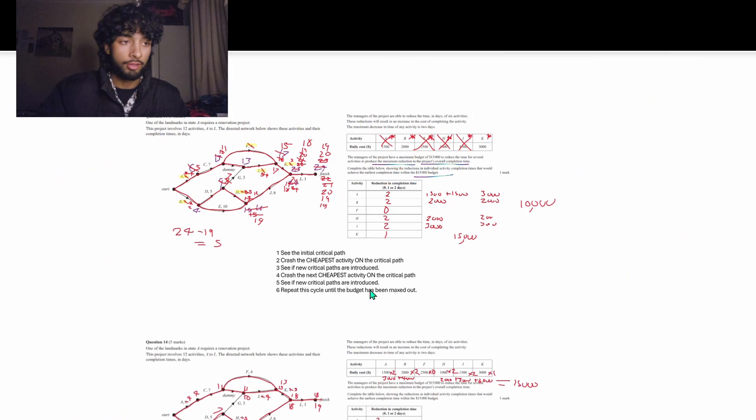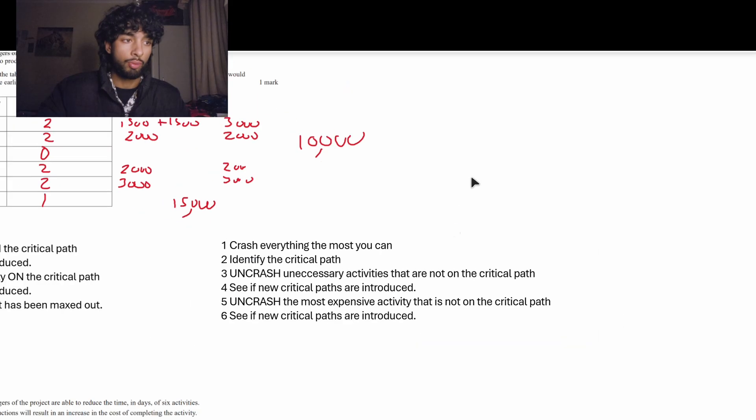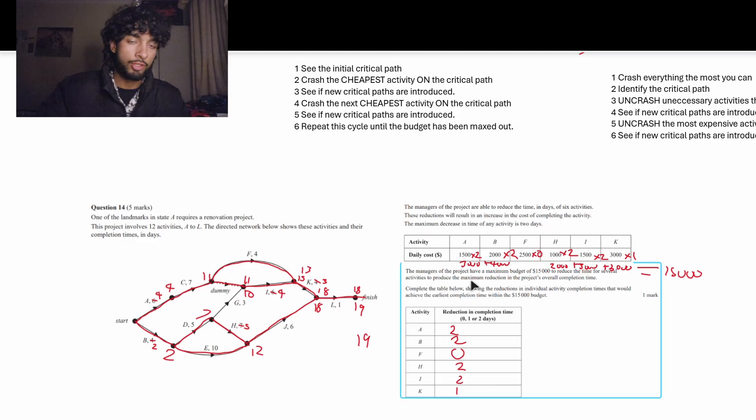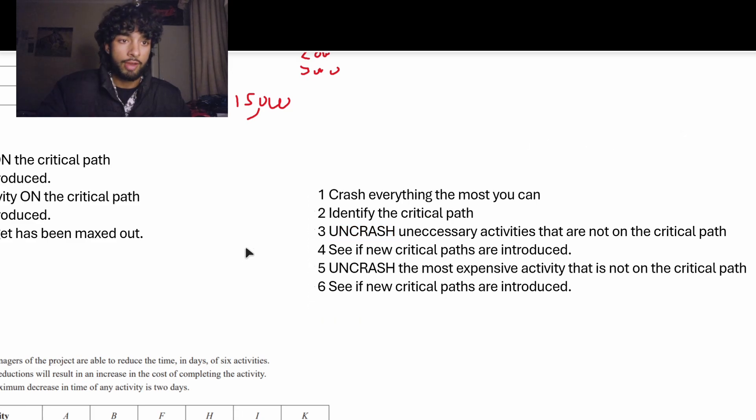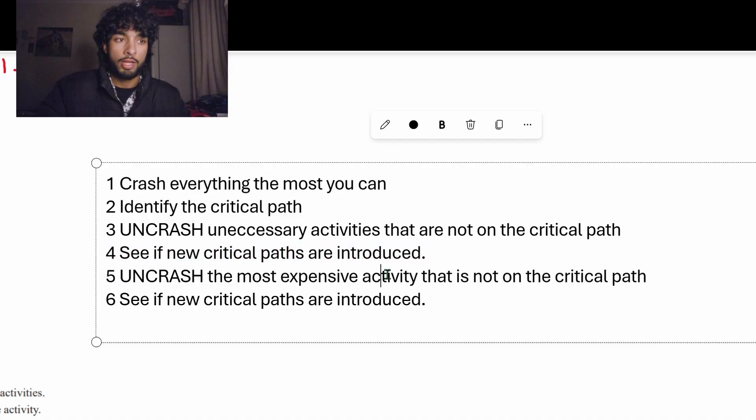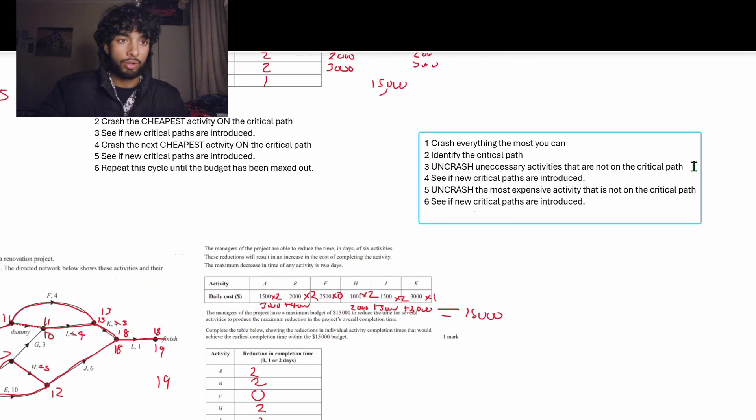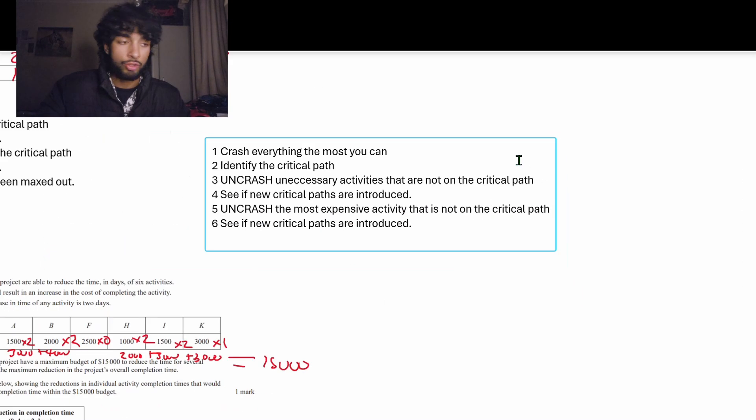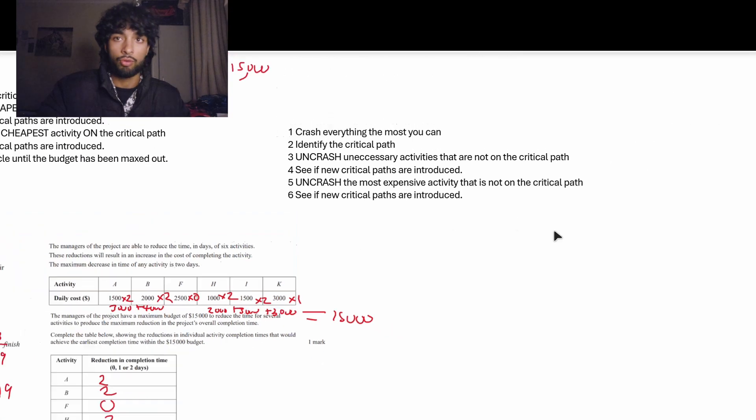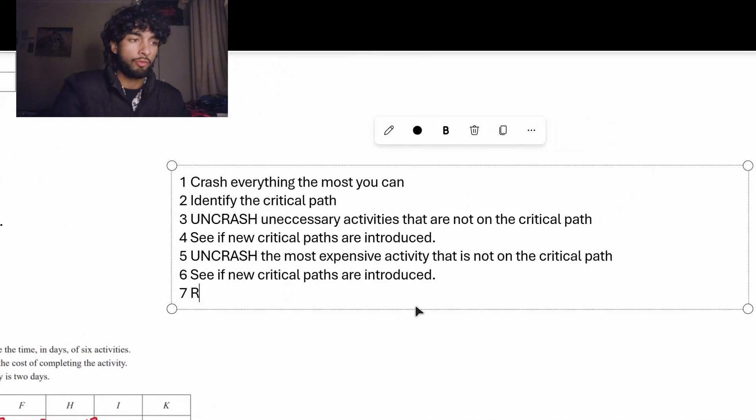In the second method, we did the opposite. We crashed everything the most you could. And then we identified the critical path. Then, instead of crashing things, we uncrashed unnecessary activities that are not on the critical path. And then we saw if new critical paths are introduced. Then we also uncrashed the most expensive activity. K was the most expensive activity and it wasn't on the critical path. Then we saw if new critical paths are introduced. And then you repeat this cycle until you fit inside the budget.